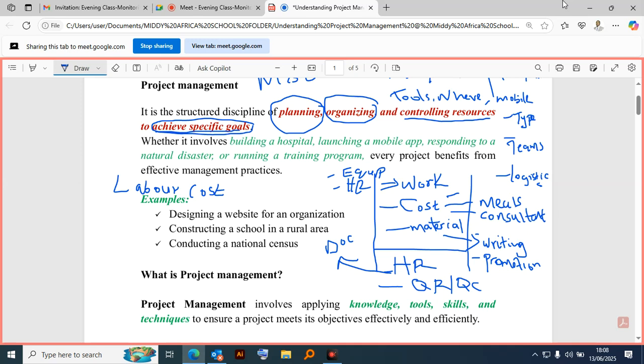You present this quotation to logistics, and then logistics will go through the purchase process. Then when you secure the items in your hands, you make sure that you have an invoice for all this, so you have proper records of how many you purchased. That's one.